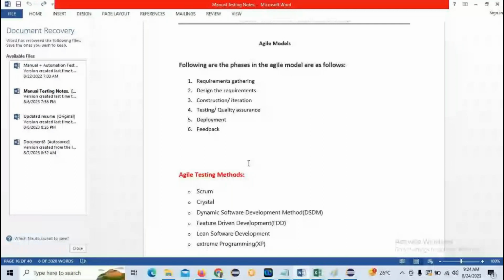In the previous models, we can't deliver the product to the customer until the entire project is complete. But in the Agile methodology, once we are done with sprint one, we deploy the sprint one features live, so the customer can see the progress of the project, right? Getting my point? In total there are 90 features, 30 features per month. Each month has 2 sprints, so in each sprint we develop 15 features. Once we are done with those 15 features in sprint one, we deploy them to the customer. Hope you are getting what I'm speaking.